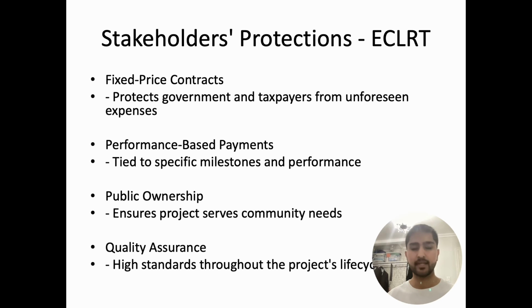Now talking about stakeholders' protection in ECLRT. The first is the fixed price contract, which is protection for the government and taxpayers. The private sector must cover additional costs beyond the agreed amount, protecting against unforeseen expenses. Performance-based payments. Payments are tied to specific milestones and overall performance, ensuring accountability and high standards.